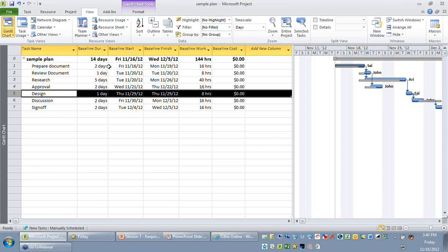The second problem is you don't have any traceability now. Let's say a few months down the line, the customer is asking you, or you might want to look at, hey, we had an activity like this, but that activity is now missing. We don't know what the estimates were at the beginning of the project. Naturally, those questions cannot be answered because you have done a hard delete. It's very difficult to recover that task now. So what I recommend is don't delete a row like this, like what you do in Microsoft Excel. Rather do it in a very polished way.